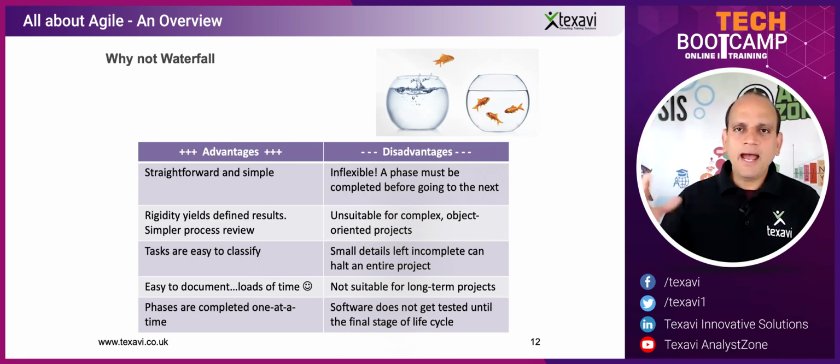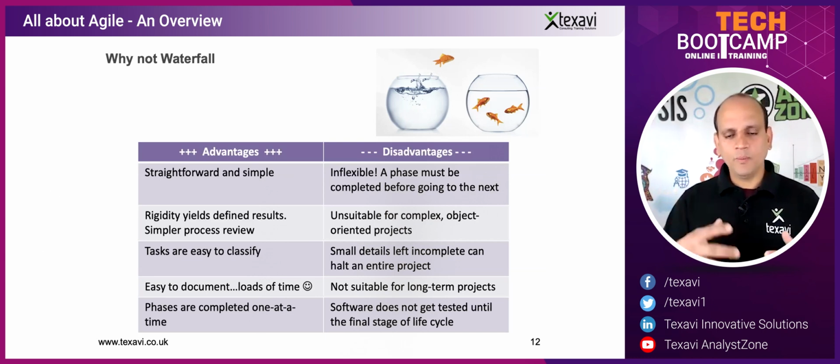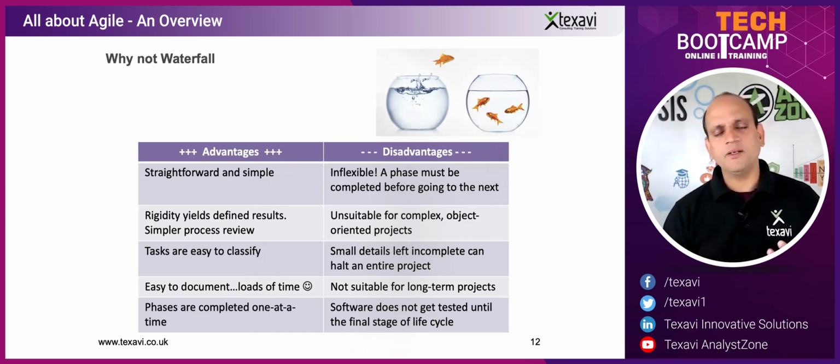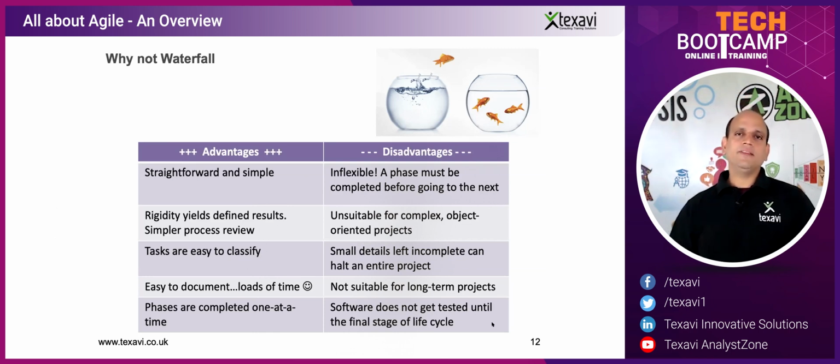You're trying to add more and more fat, but you can't understand that there's no linear relationship between the number of people and the amount of work they do for productivity. So in effect, you're just adding flab onto the project without any clear result in terms of productivity or the work itself. That classic case of putting 9 mothers to create a baby in 1 month leads to disaster. And that's the reason why it never worked.